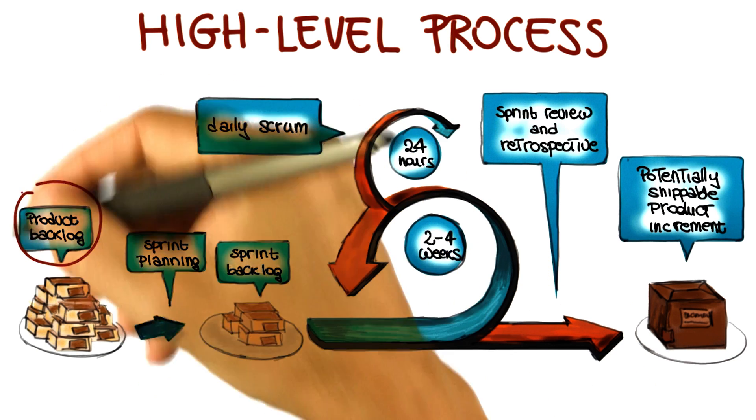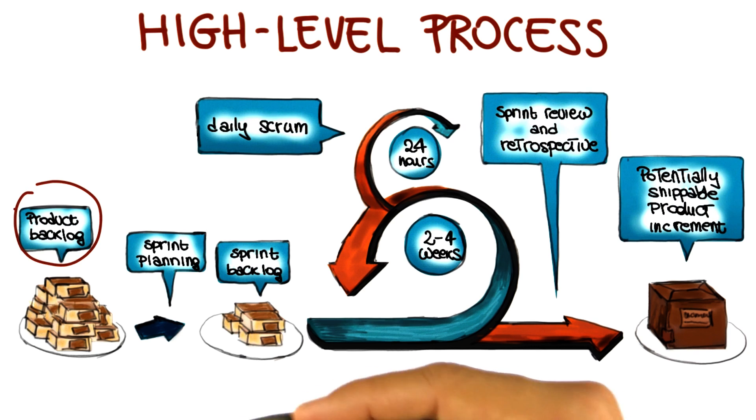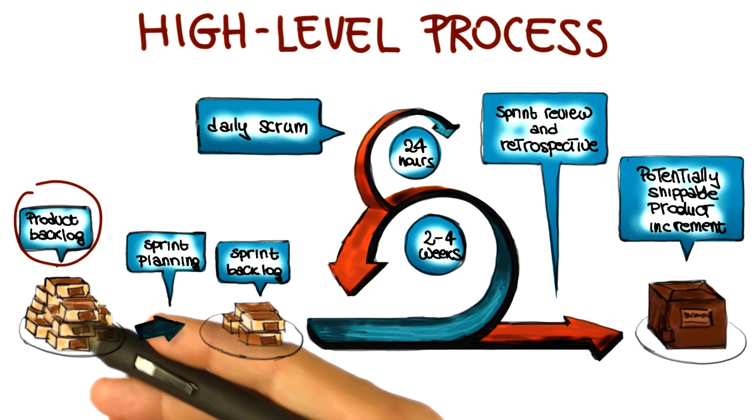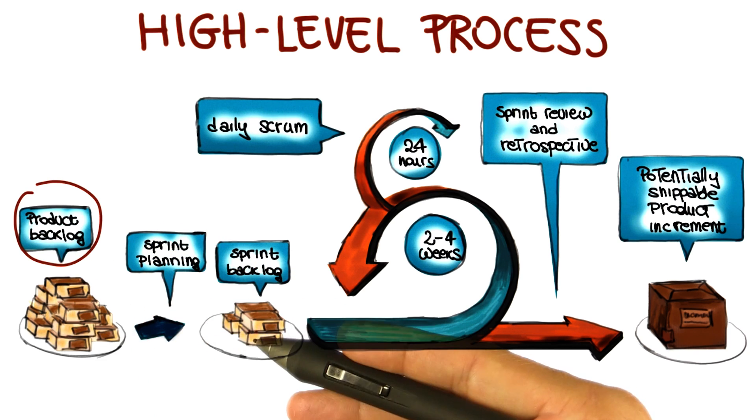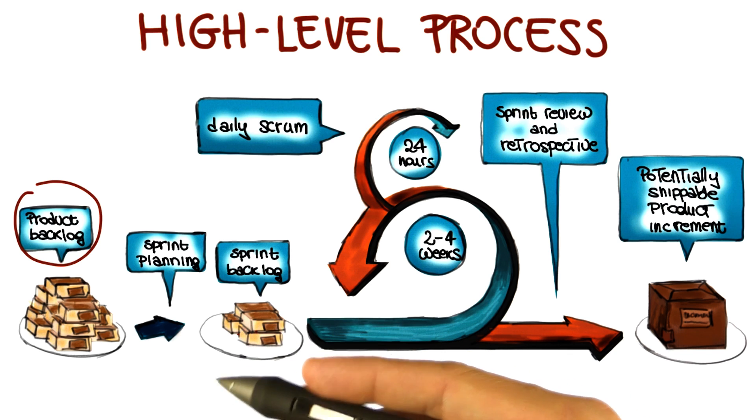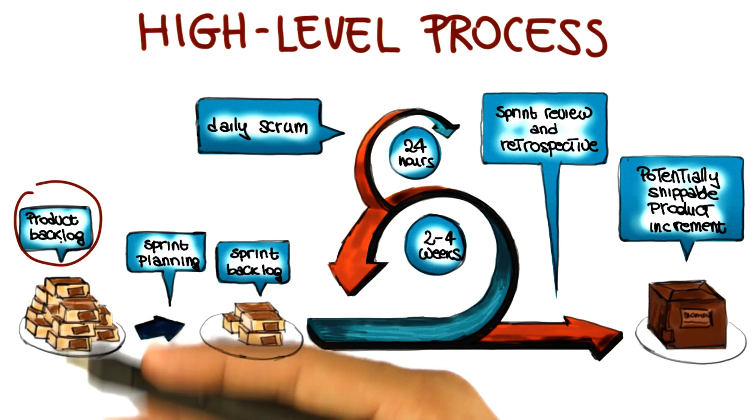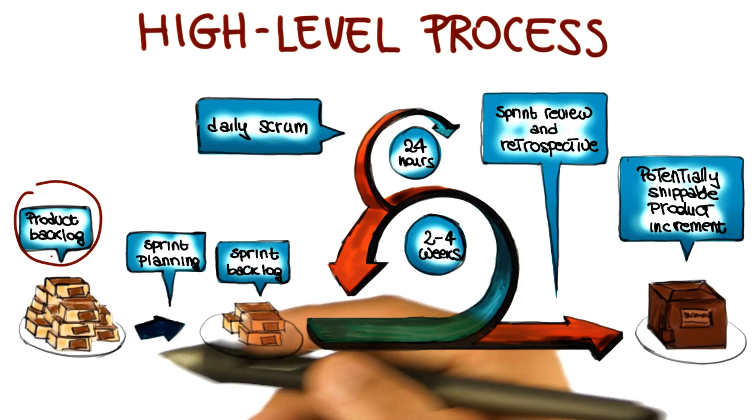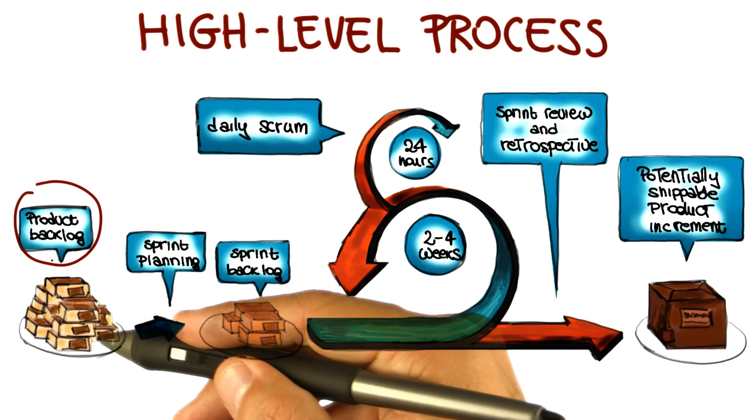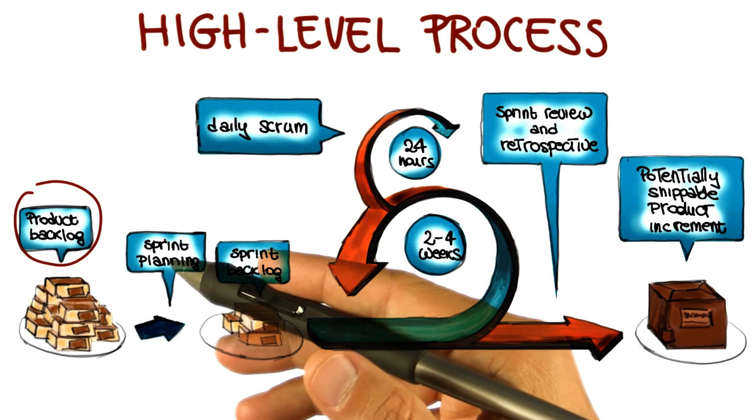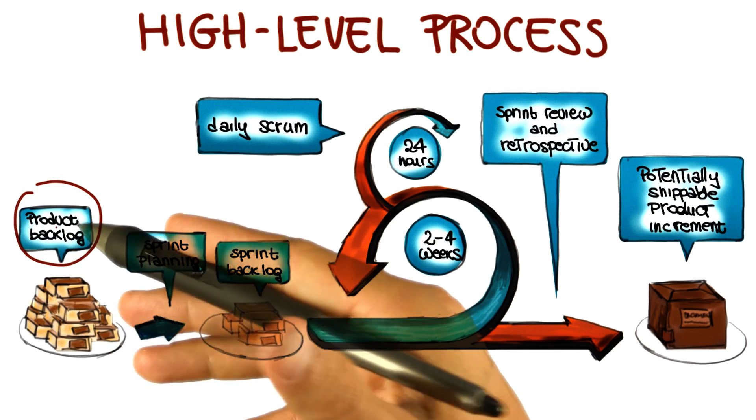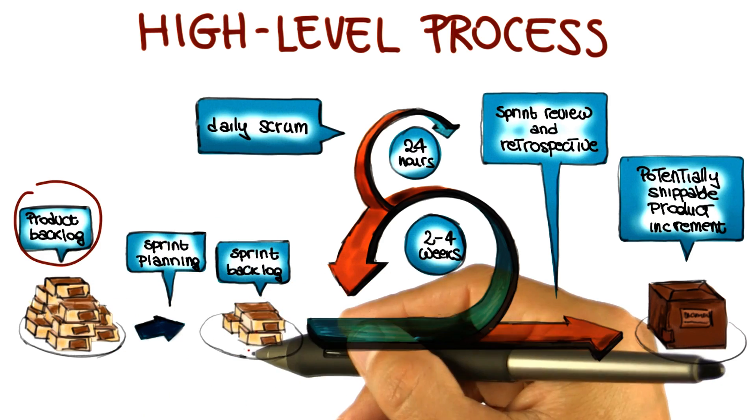We're going to start with the product backlog. Product backlog is the single source of requirements for the process. They're ordered by value, risk, priority, and necessity, so that all of these characteristics can be taken into account when selecting which backlog items to consider for the next iteration. It's a living list, in the sense that backlog items can be added or removed, and it's normally defined by the product owner.